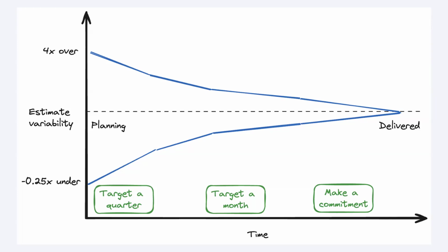And this picture I've drawn here is based on the classic cone of uncertainty. This was a guy called Barry Boehm who did a whole lot of project research a long time ago, and it wasn't even on software projects, but it applies just as well to modern software product management as it does to the sorts of things that he was studying. That showed how estimates vary over time. And what he actually found after looking at all these different projects was that it was not uncommon for variability in estimates really early in a project to be 4 times the size that they were originally estimated.